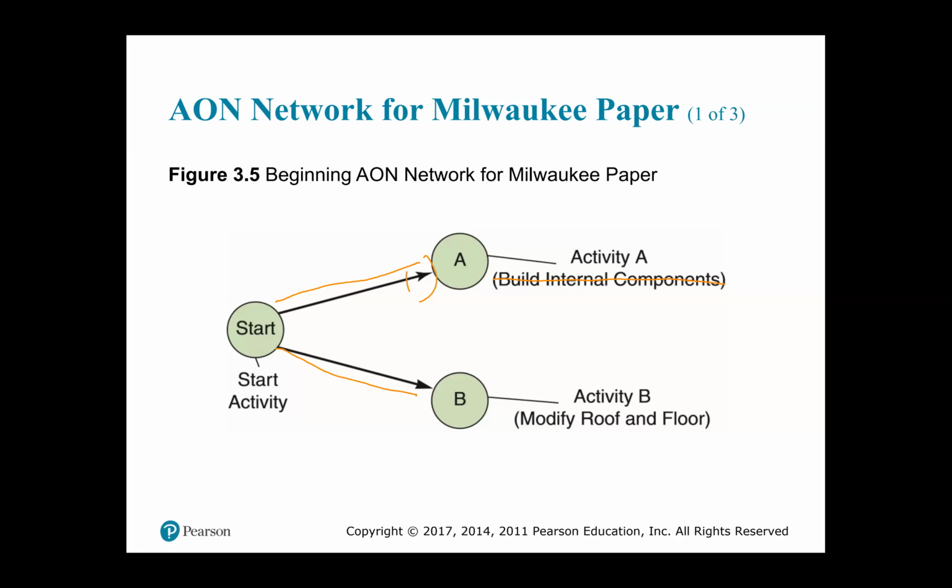They must come out of the start node. Why must they come out of the start node? Because they have no predecessor relationship. They are activities that you will do at the beginning of the project. They are startup activities, so they will come out of the start node.